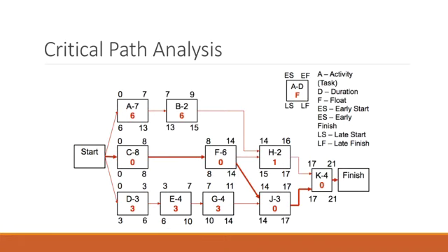So clearly the one that I showed you, 8 days, 6 days, 3 days, and 4 days, is the longest path. When we're thinking about the critical path analysis, we are choosing to go for the longest path that you have in there, because that's the shortest or the fastest that you can complete this particular project.